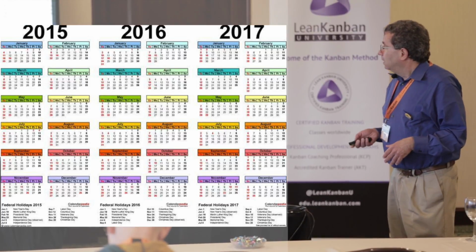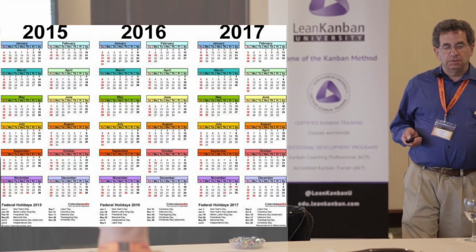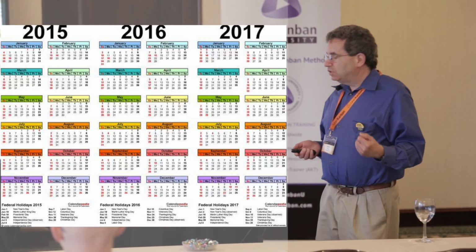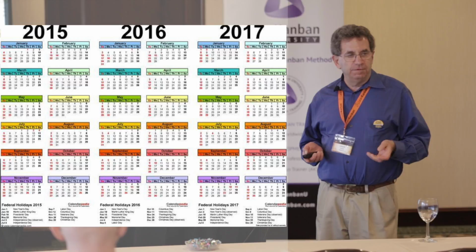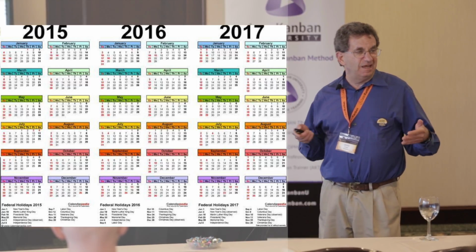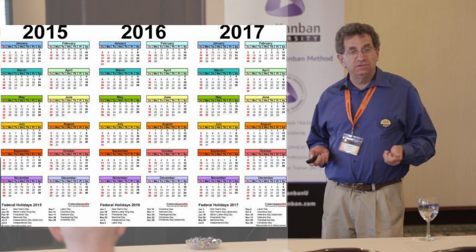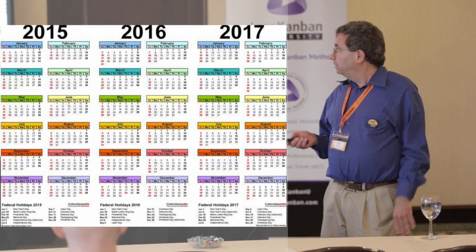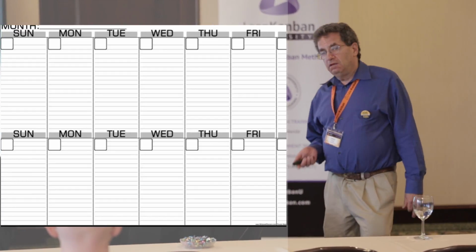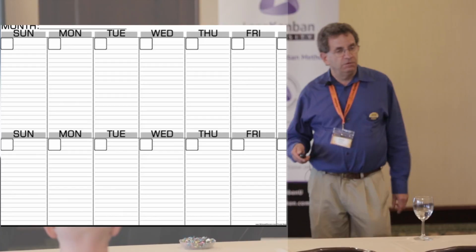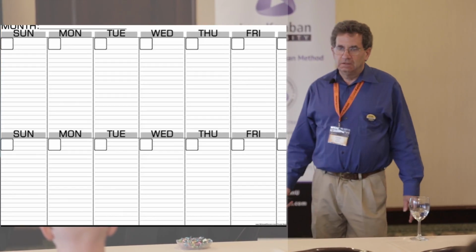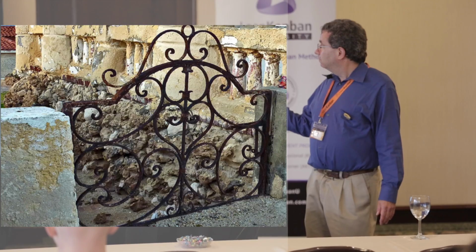So we also transitioned, because of the transition to Agile, we were able to change the time scale of the projects that we were working on. Instead of working in projects that would take anywhere from 18 to 36 months from start to release, we're now releasing into production every 3 weeks. You got stuff that's done, it goes into the release. It's not ready, the train leaves the station, you wait for the next train. Every 3 weeks on that cadence.